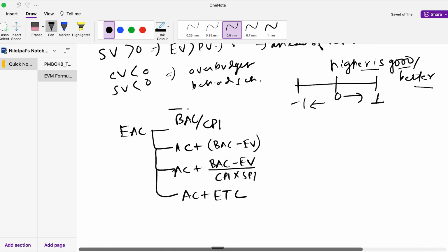Okay, so listen carefully. So when in your scenario of earned value management, it is given that the performance of the project will continue as the current CPI regardless of whether it's high or low, you need to apply this formula, which means that if your CPI doesn't change and if it says that the performance will continue, use the formula EAC is equal to BAC divided by CPI.